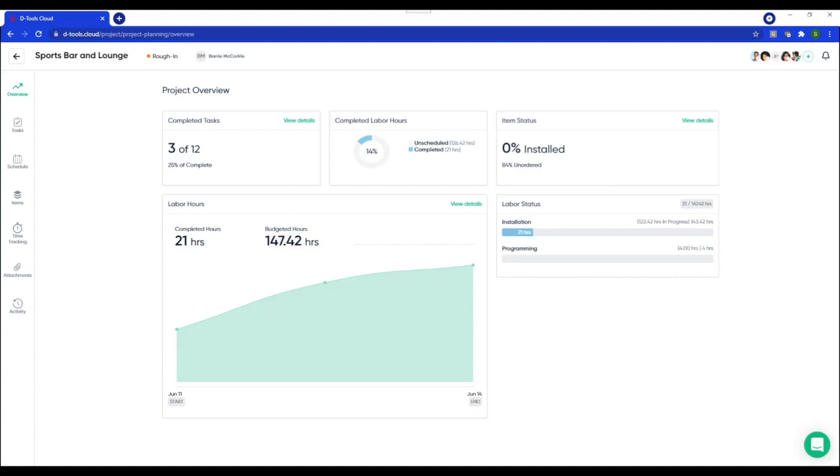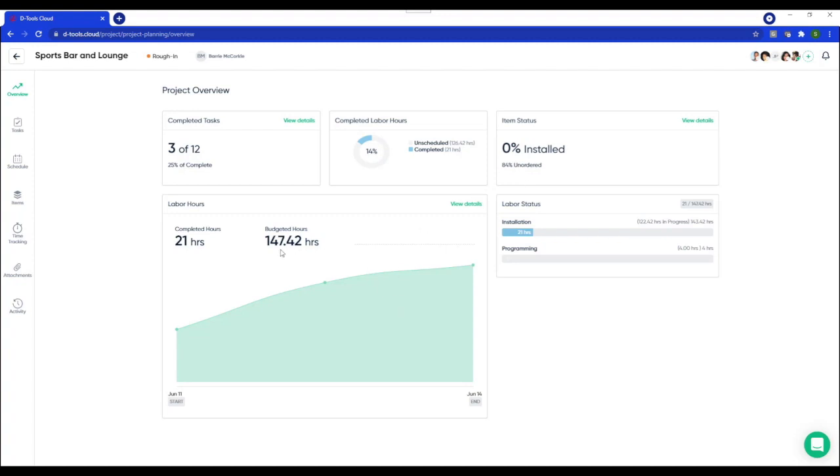So you initially land on the overview tab and this is where you can see your progress at a glance. You can see how many tasks are completed and the impact that it has on labor. You have visibility into item status and can see the percentage of equipment ordered and installed. Then below you get a burn up chart that tracks actual versus budgeted hours. So it's going to be really easy for project managers to see the hours remaining and plan accordingly.